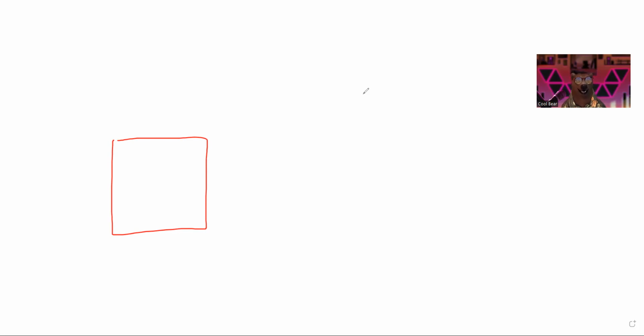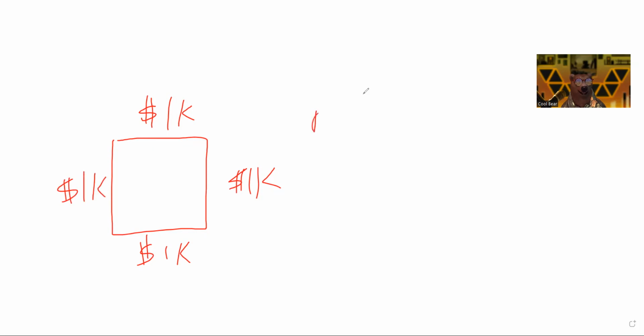And I said it would cost $4,000. $1,000 for that side, 1,000 for that side, another 1K for that, and 1K for this. The budget at completion is $4,000.